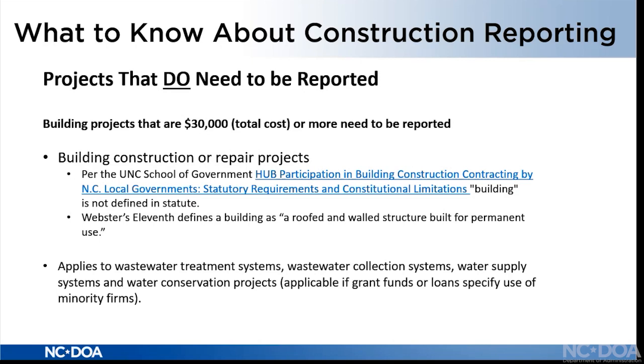If you are building a school, that brick and mortar part of the school, that definitely has to be reported. If you're building the entire complex and like a tennis court outside or a basketball court outside is something that you're covering, that can be included. If you're doing that separately, like the school is already in place and you say, you know what, we need to redo the basketball court, it's been years and it's falling apart and the pavement's all cracked, that can be done as a separate project.